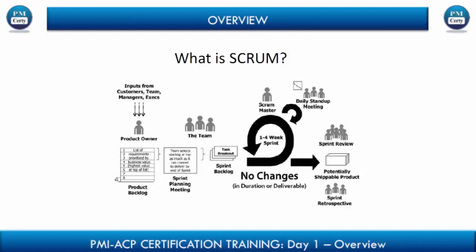Negotiation can be done by the team on the timing of the task or the feasibility of the task. What the team cannot do, definitely can never do, is say this is not high priority, move it out. So I'm emphasizing this because you will get a question in the exam where it will give you a subtle scenario where it will say you decide as a team member that this is not of high priority, or somebody from your side of business comes and says it's not high priority, or even from a client business side comes and says it's not high priority.